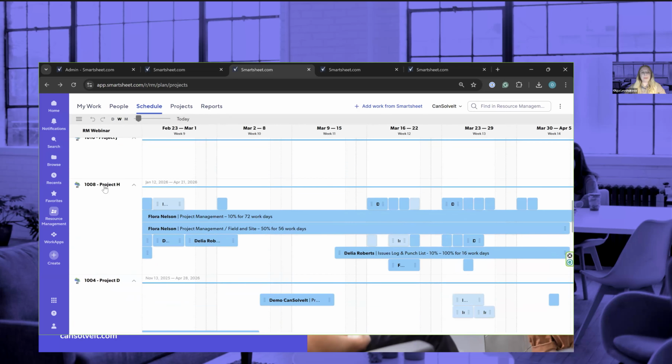Right, I see that I have a big H project that has some work, and also I have my PTO. I see that somebody goes on vacation in March. Also, Flora, what is Flora doing? Flora is on sick leave today. I probably need to check what's going on because Flora has a sick leave today, and also I assigned her. She's managing the project. So maybe I would need to change something and free the schedule and ensure that during these few days somebody will cover for her. So this is where I see what's going on.